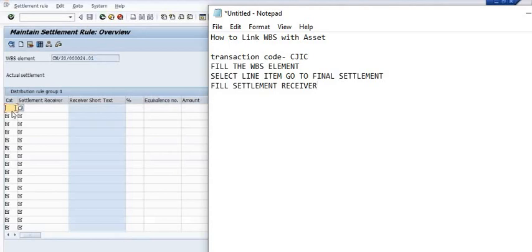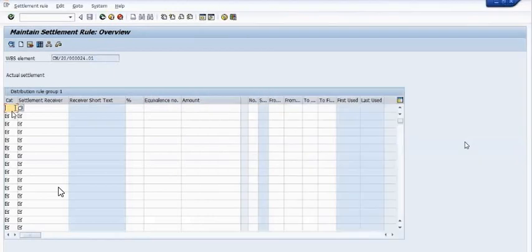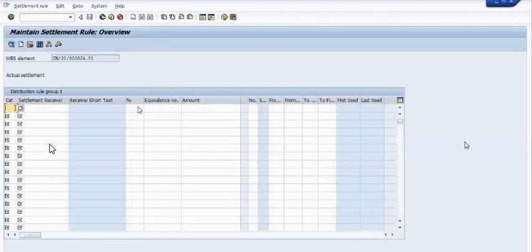The settlement receiver is the asset number — the asset master. In the settlement receiver, you can maintain more than one asset.